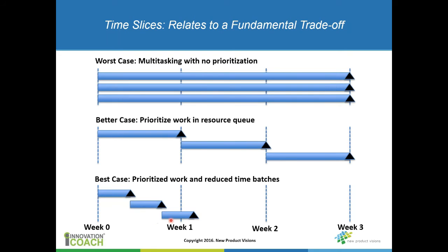So if you break up the work into smaller chunks and synchronize it with the other content providers, then this will work. It's not like multitasking, but you can break it up and keep all three projects moving forward, because really the reality is that if you do it strictly in this fashion, this lower priority task is always going to get shortchanged on resources. So there is a way to do it better by breaking these tasks up into smaller chunks, figuring out how to synchronize the work, and reducing the risk of inadvertent multitasking across all those tasks.